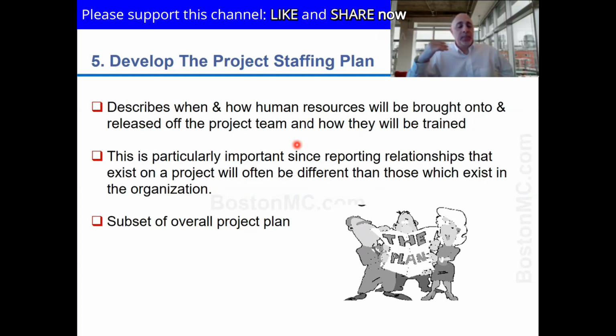To bring them, maybe you have to interview people from an agency, screen them and so on, and then pick your best and train them, give them some devices like laptop or things to work with. So you have to think about the timing of this, and you need to develop an overall staffing. You cannot just wait until it's time to do an activity and look around and see which resources are available.